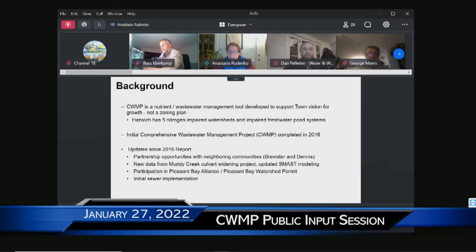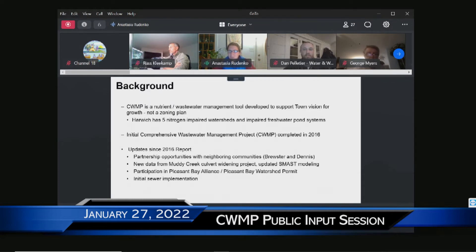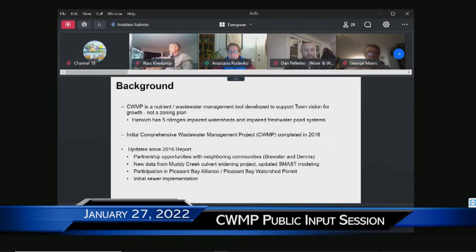In 2016, the town completed an initial comprehensive wastewater management plan that was approved by the state. Since then, there have been a number of updates, including new partnership opportunities identified with neighboring communities, specifically with the towns of Brewster and Dennis. The Muddy Creek Culvert Widening Project has been implemented, which has increased the tidal flushing of that system.